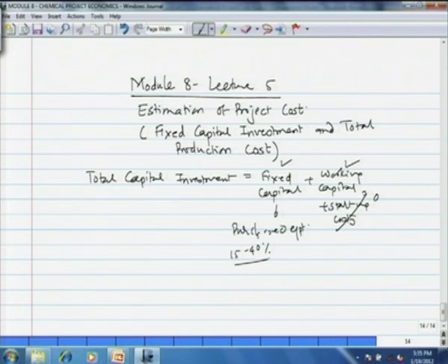An easy way is through vendor's quotation, but a vendor may not give a quotation unless and until he receives a confirmed order. So, if we are going for a pre-design estimate where we are estimating cost with limited accuracy or with limited data, then we can go for certain thumb rules for estimating the cost of equipment.